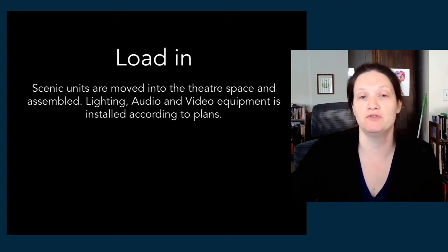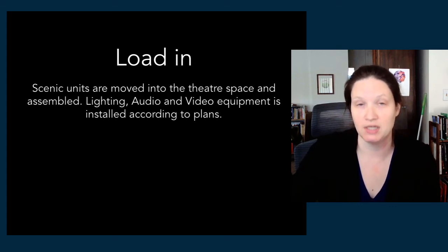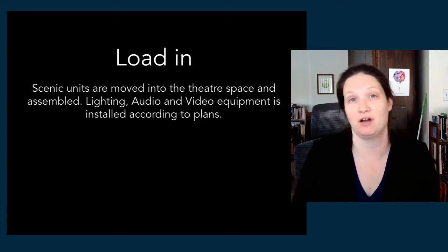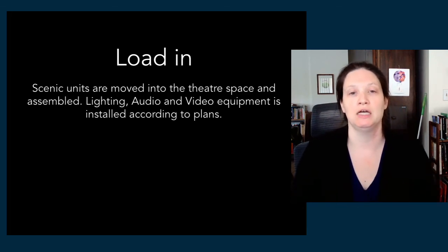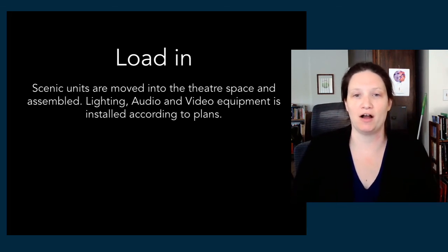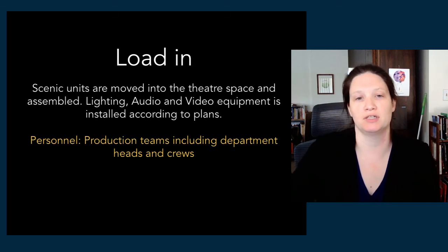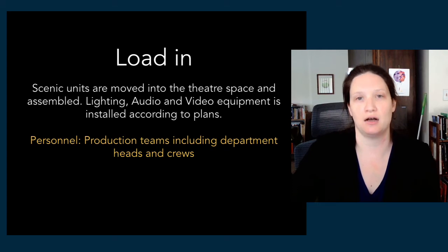Load-in is when we move the scenic units into the theater space and assemble them on the stage itself. Typically, they are not built on the stage. They're built in another space, in a shop, sometimes not even on the same site. And so that load-in day is when we move in our scenery. We also have lighting, audio, and video equipment that is installed according to all of the plans that the designers have created. So this is all of your production team, department heads, crews, and frequently designers will come in for this load-in period to help support.